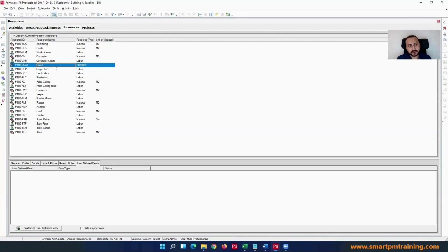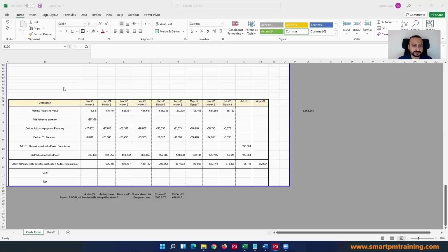But the resource I am talking about is the actual cost by contractor. What is going out from the bank account is in the procurement activity itself. Like if you can make it maybe $2 million going out from the bank account based on that activity.